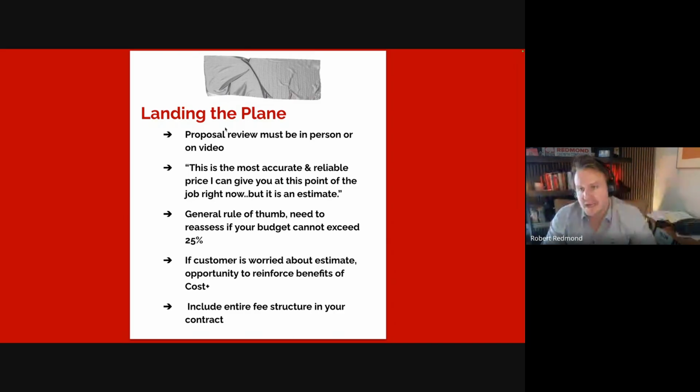Now, regarding outdoor living, my only thought would be if there are a lot fewer unpredictable variables in those kinds of projects, meaning if you can look at a scope and know there's not going to be a lot of changes to it, or a lot of variables you're going to uncover when you start the project that would change the scope, right? In some of those types of projects, it may make sense to do a fixed price, right?